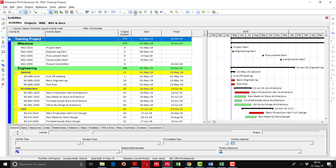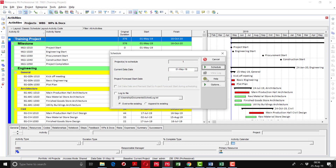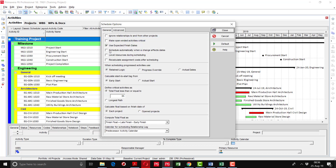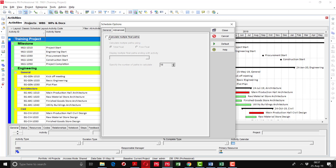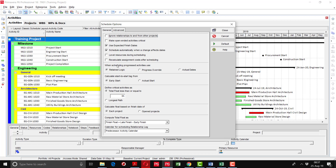Going to the schedule options, there is a 'Schedule Automatically' option. If you check this, whenever you change any duration or length it will automatically reschedule at the defined data date. In the advanced option there is an option to calculate multiple float passes. Under scheduling progress activities, there are three options: retain logic, progress override, and actual dates — keep it on retain logic. You can also change the total float criteria value here.